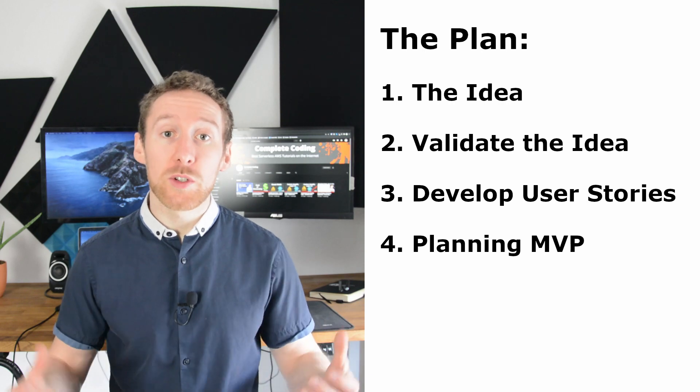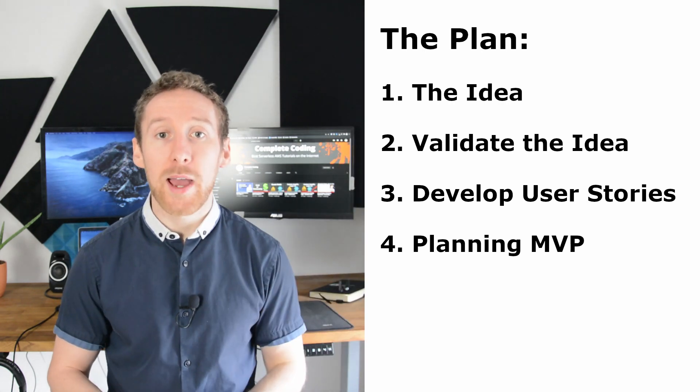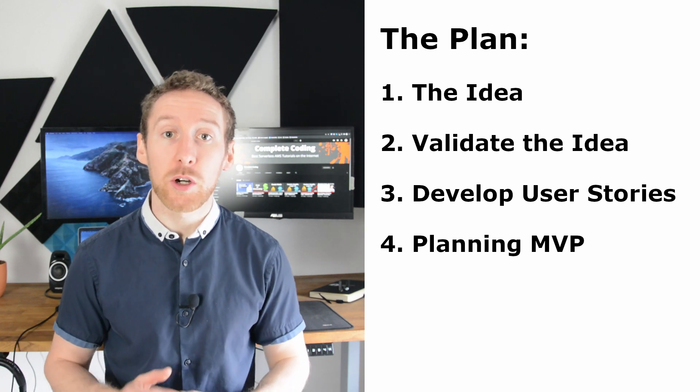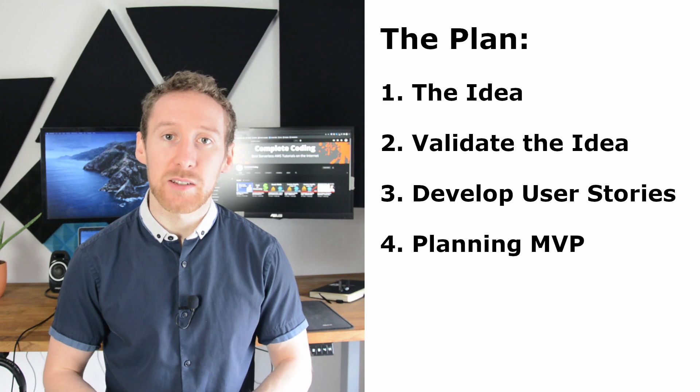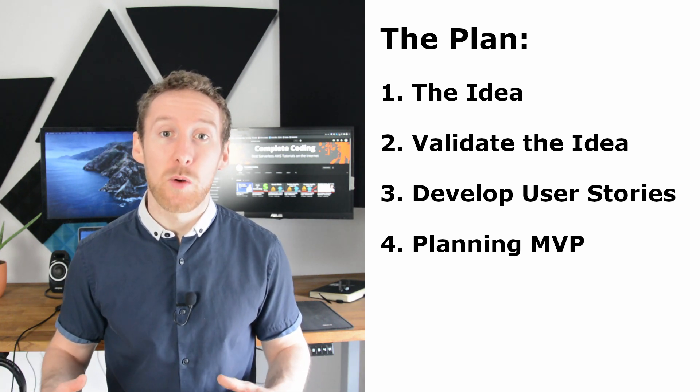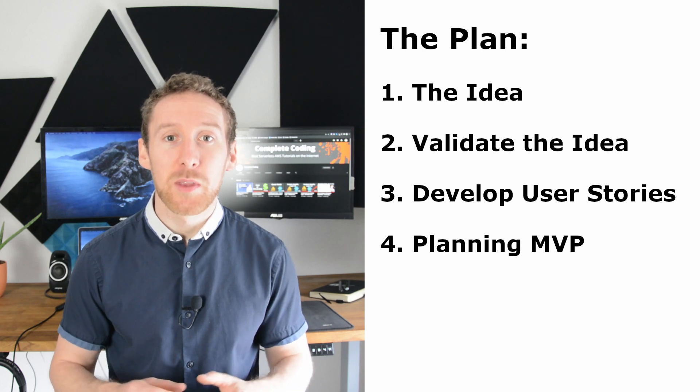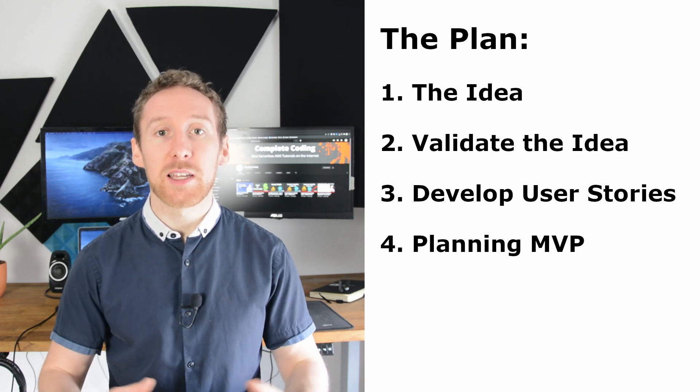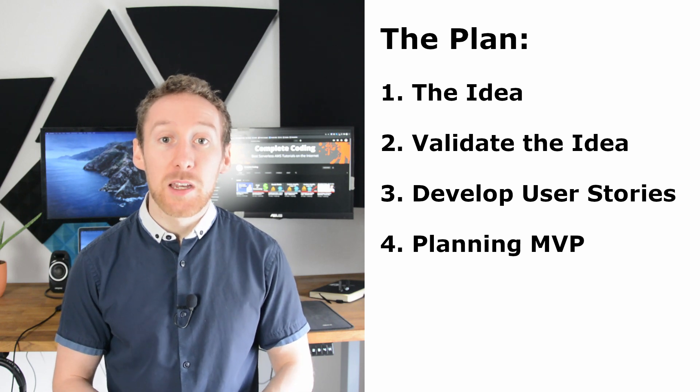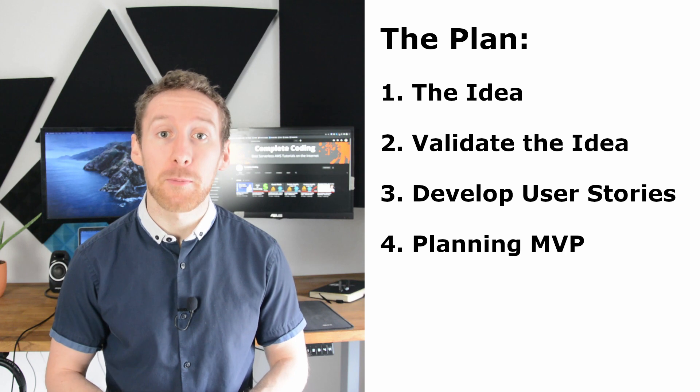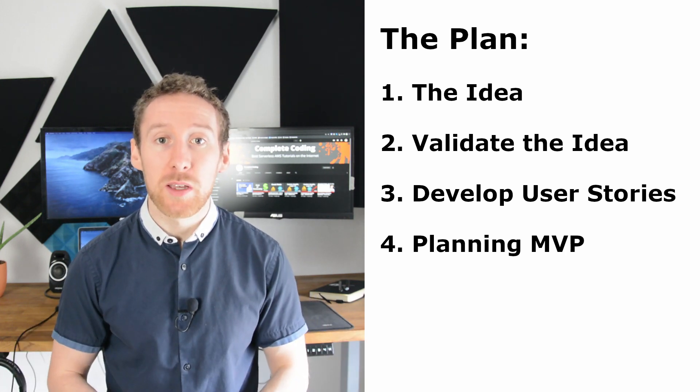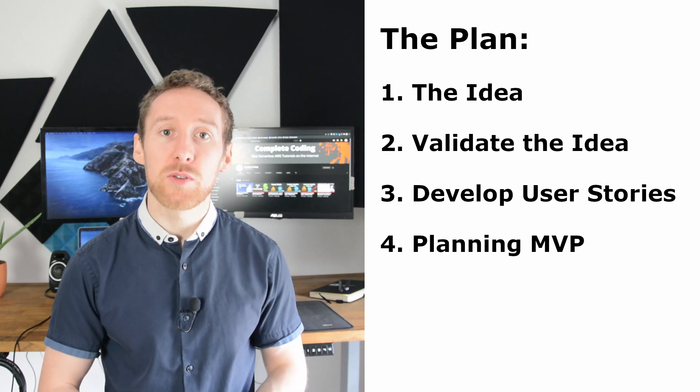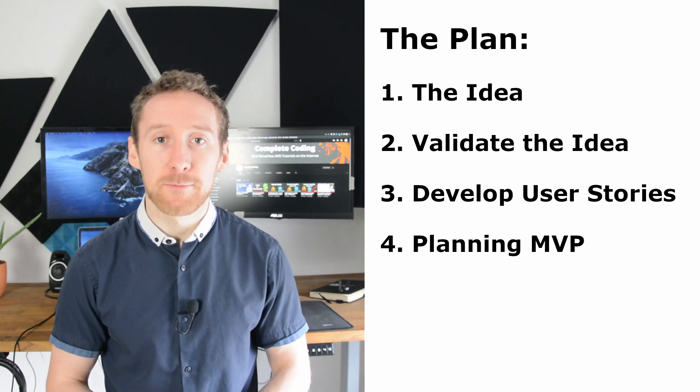Once you have this ordered list, go through and decide where your minimum viable product cutoff is. And this should stay fixed. One problem that a lot of software has when it is being first developed, is that they keep adding features before releasing the first version. This is often called scope creep or feature creep. And it means that you never get your product out into the hands of real users. So you don't get the feedback that you need.